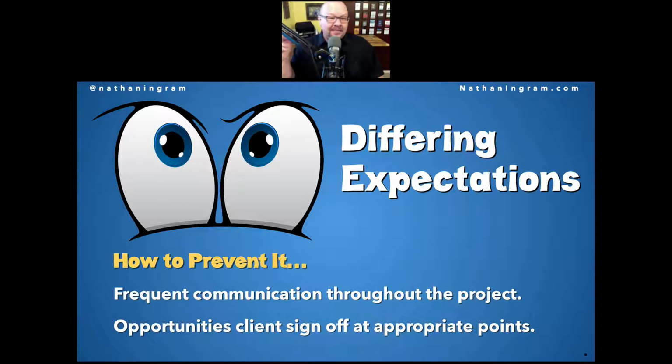It's very simple. Past, this is what we did on your project this week. Present, this is where we are, as far as the project stands in total completion. Future, this is what we're going to be working on next week. It takes just a couple of minutes for every client to send that out. I do it every week. And this is a great opportunity also to remind the client, hey, we couldn't do anything this week because we are still waiting on your content. So it's a good time to do that. But the more you communicate throughout a project, it keeps expectations on track.